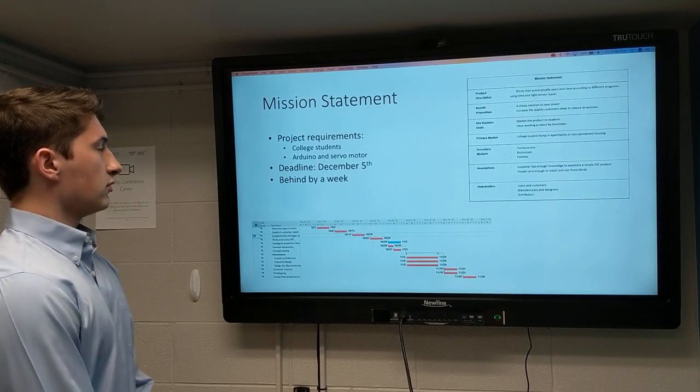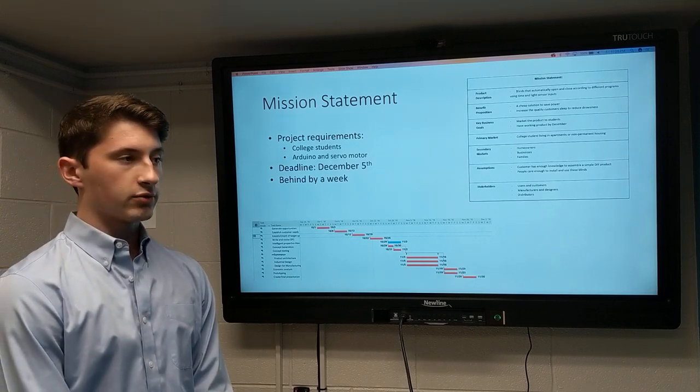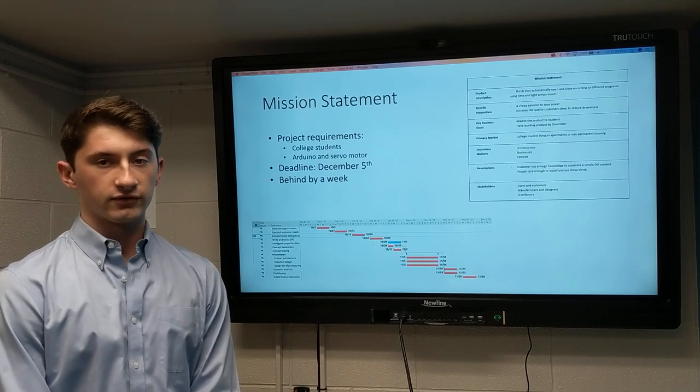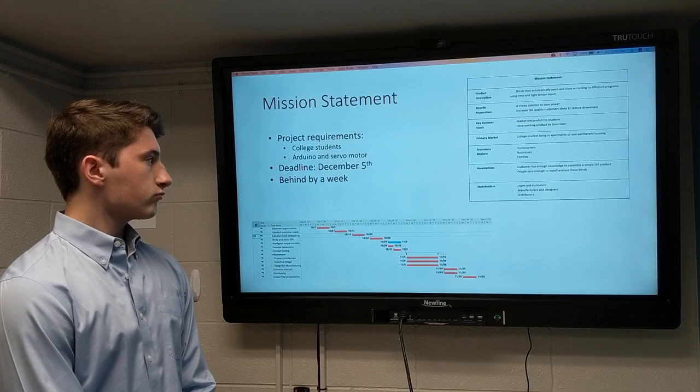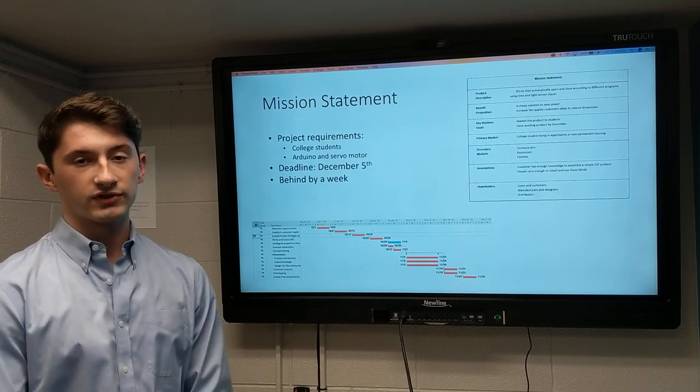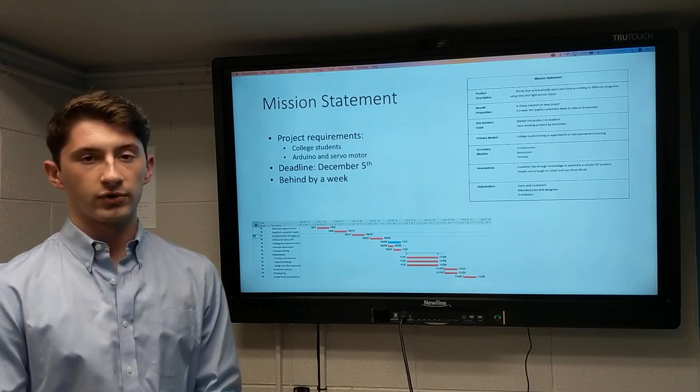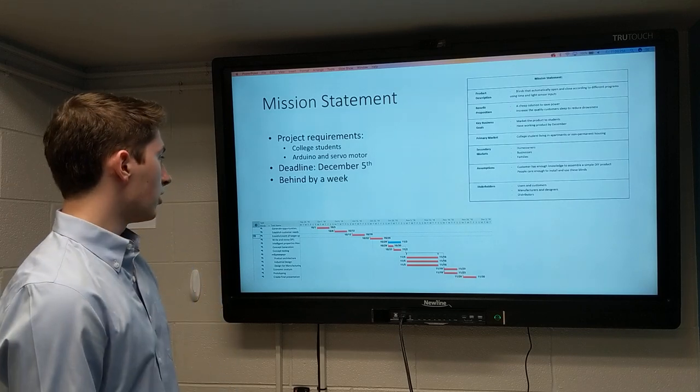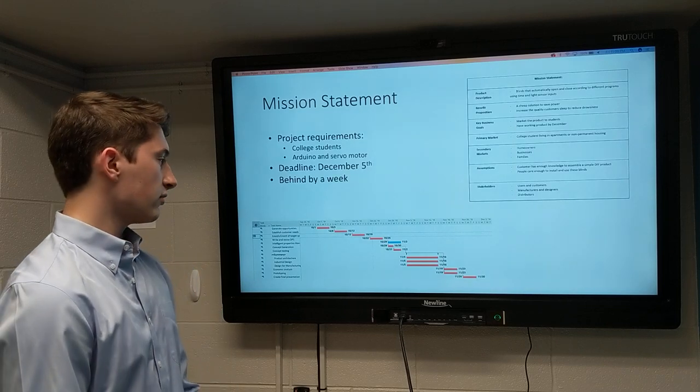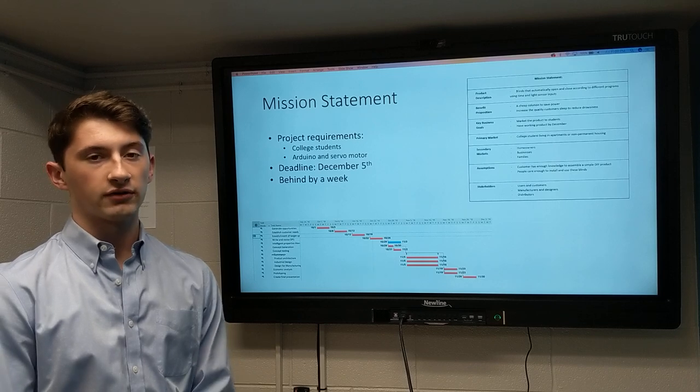Our mission statement: this project for VTABS required us to make a product that we could sell to college students that incorporates an Arduino and a servo motor. Our key business goals are to market a product towards college students and to have it incorporate that type of technology. The deadline is December 5th, which is coming up really fast. Currently, based on our original Gantt chart that we made, we're about a week, a week and a half off where we should be.